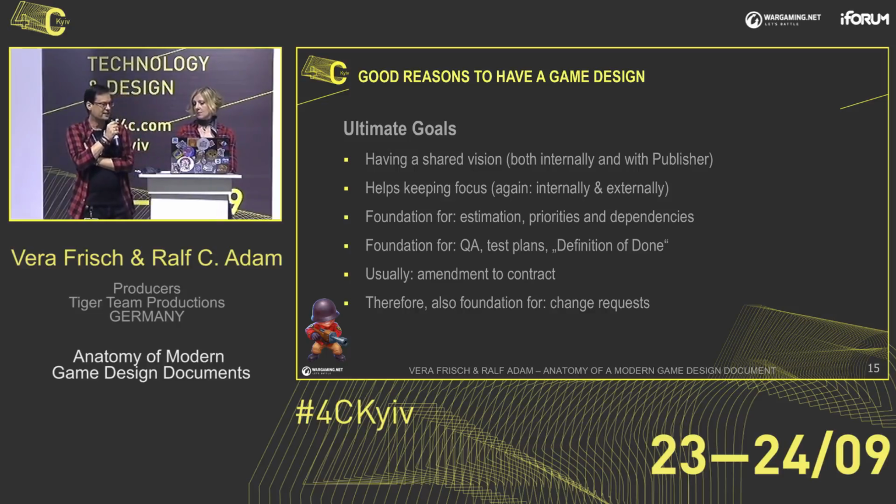I have not worked in any publisher-developer relation where it was not ultimately said somewhere in the contract that whatever is in the design is the thing that you have to deliver as a developer, and it's bound to the contract. So it's kind of an amendment to your actual agreement with the publisher. If you don't have something in writing, it's bad for you because you don't have any protection.